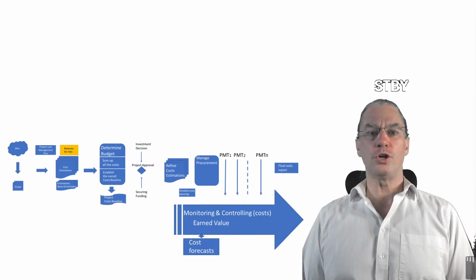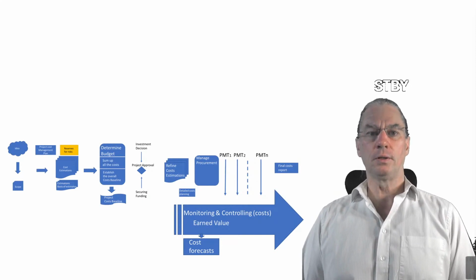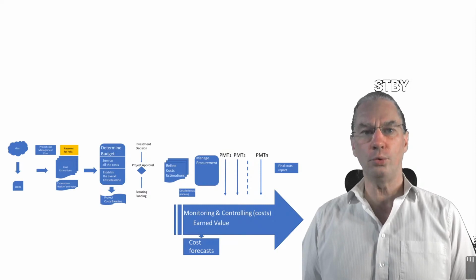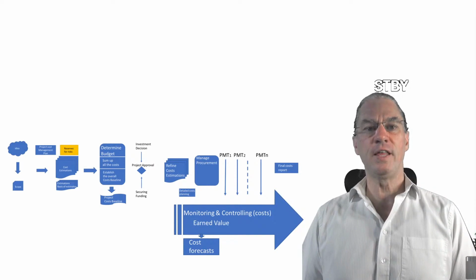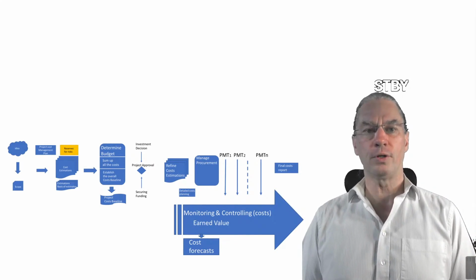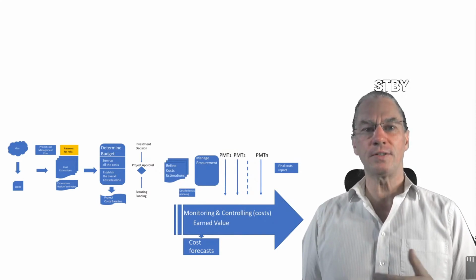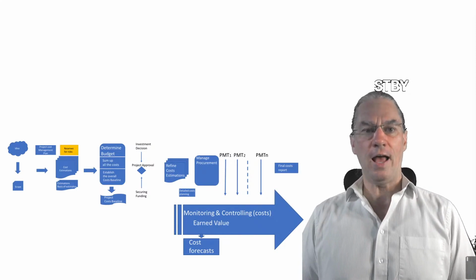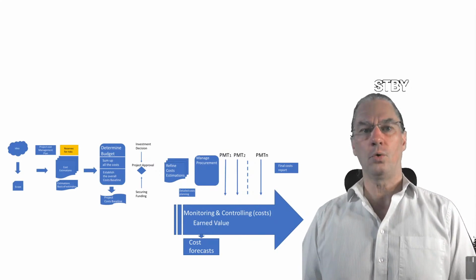At the end of a project, we do what is called the closing. The closing also contains a financial part in which you do a final financial report. It's there that we report all the costs that we had in the project, the performances, and also indexes to show how the project evolved cost-wise, or financial-wise.